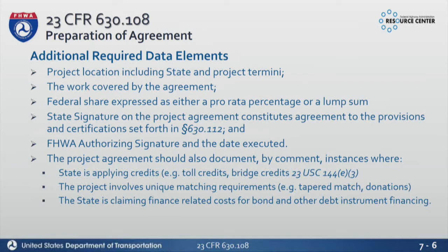When we came up with FEMAS 5, probably 6 or 7 years ago, one of the big updates was the location field. So this would be a linear reference GIS type of a location that identifies where that project's going to happen. And so that's a very specific location item that has to be on all of our projects. It's not required in 2 CFR. This is a requirement of Federal Highway Administration in our CFR, 23 CFR.